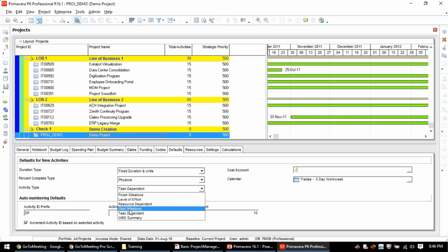So my project has started, that's a milestone. My project has gone to, say, 50% of the work done, that's another intermediate milestone. My finish milestone is that my project has been successfully completed. So milestone is an indicator. Normally we think milestone means something really achieved, but that's not the real meaning. Milestone is just an indication that we have completed a specific portion of the work, based on which the payment system, etc. works.